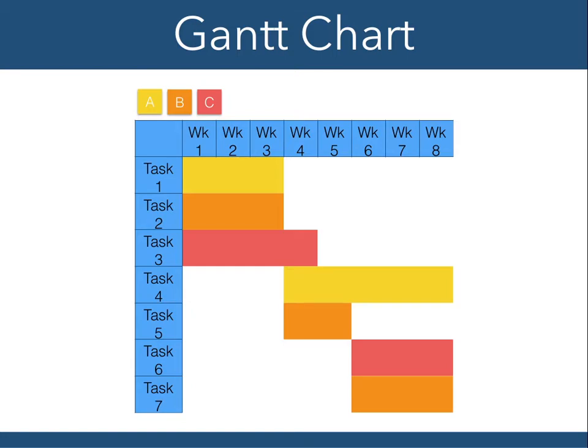So what this is showing is that initially we have 3 completely separate projects that don't depend on each other. Task 1, Task 2, and Task 3, and they all start at the same point, and you give them to different people. You give one to A, one to B, and one to C. And this is quite important because it means that you've been able to work out what happens first, i.e. you don't need 1 to be completed to do 2 or to do 3, and the other way around. So that's the first trick in time management in software development, working out what bits of the development depend on what other bits.